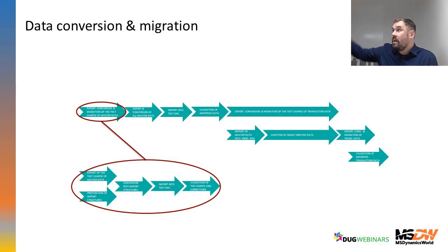You really need the majority of your data to test the final scenarios. And if you have all, for example, item cards, just now you can make the export, conversion, and migration of the test sample of transaction data. So you can stop,